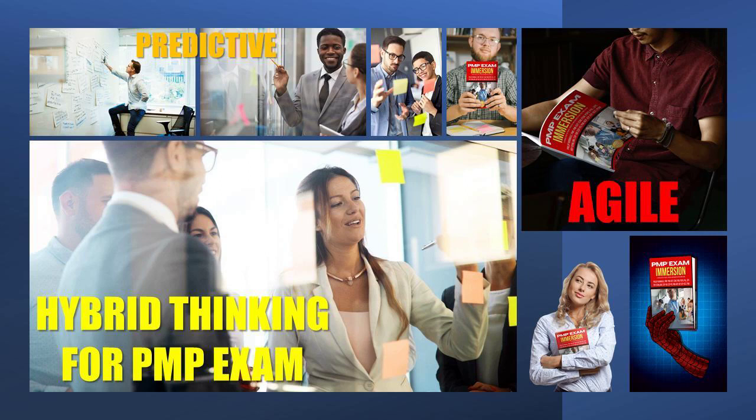What about procurement? In agile environments, specific sellers may be used to extend the team. This collaborative working environment can lead to a shared risk procurement model. Larger projects may use an adaptive approach for some deliverables and a more stable approach for other parts. Page 77 in the Agile Practice Guide and page 78 begins to go into the details of these flexible types of contracts. We could have a master services agreement for an overall engagement with the adaptive work being placed in an appendix or supplement.